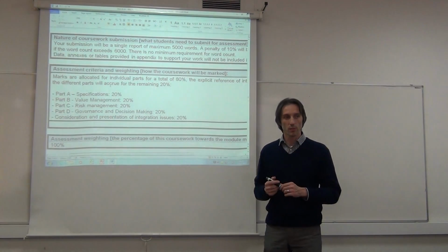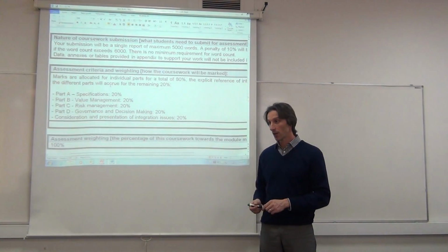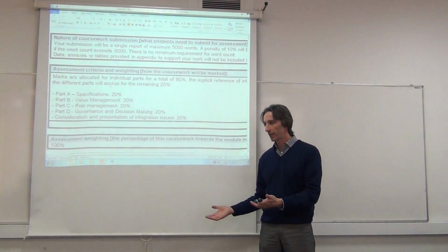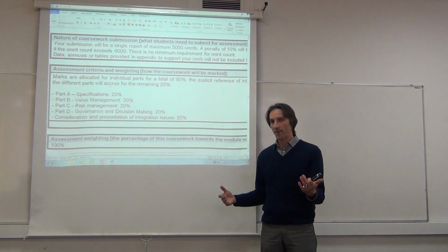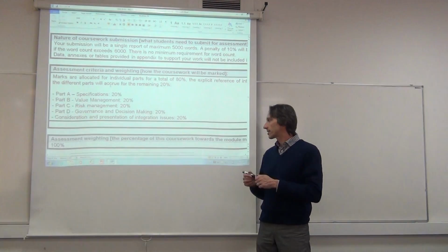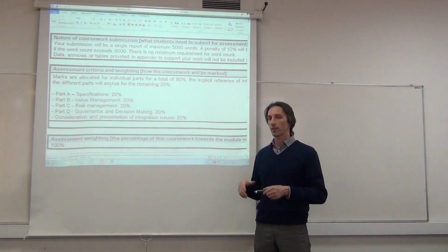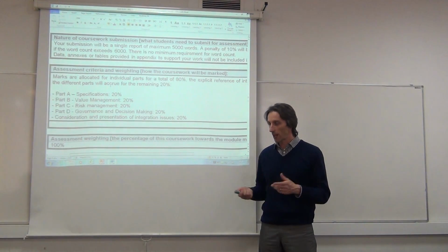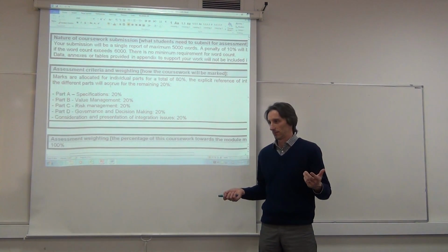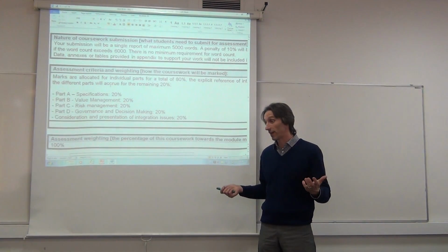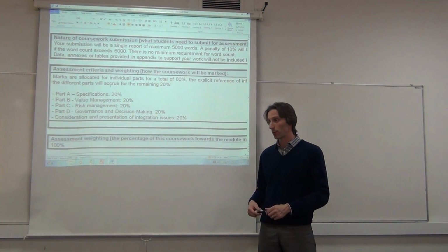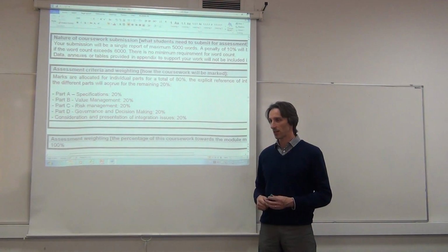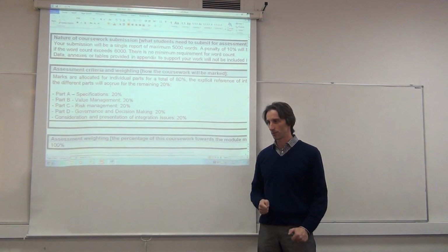So you might say, I don't have personal experience on this front, so the first thing I would do is to try and capture if there is any data available for me. So let's say that there is a risk associated with Greenpeace attacking my nuclear plant. How likely is that? I have never run a nuclear plant before. Even if I had, I would have little evidence, right? I could go on Greenpeace's website and say, well, we did 24 actions last year. Yeah, that's great.